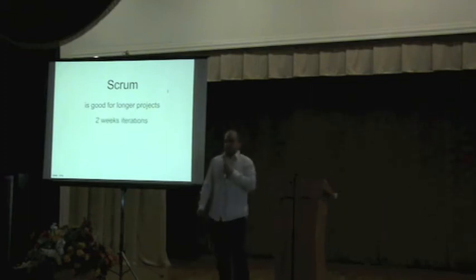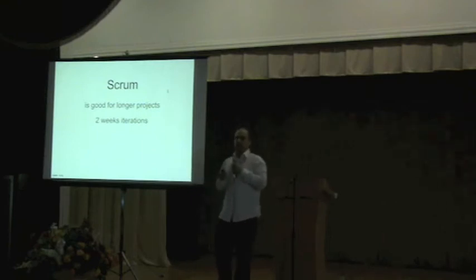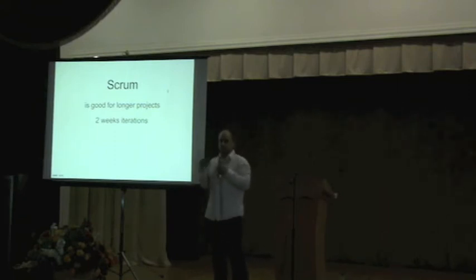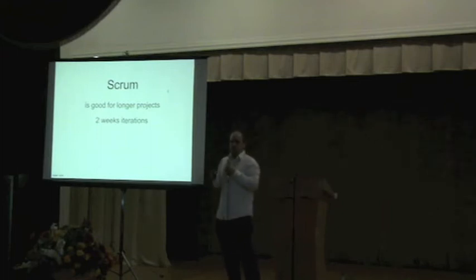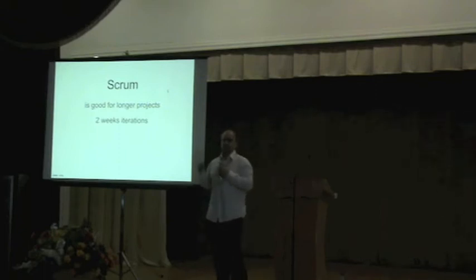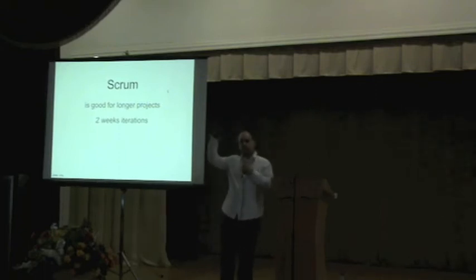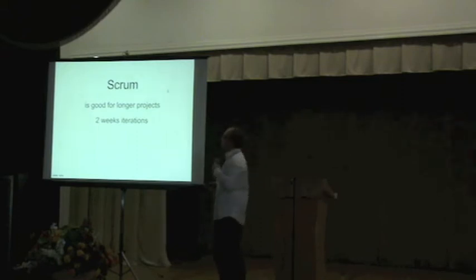We do 2 week iterations. We tried longer iterations, like 3 or 4 weeks, and we tried small iterations, like 1 week. 1 week is not enough because there's too much planning involved, and meetings, and retrospectives, and this just takes a lot of time. 4 weeks is too much, because then it's, I think it's called procrastination, that the team doesn't see the end of when they have to deliver and close the features, so they are being lazy, people are lazy.